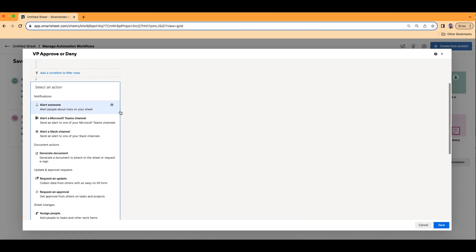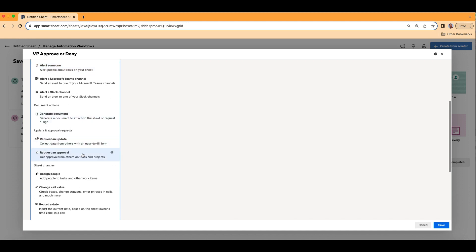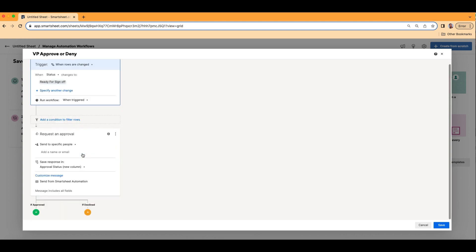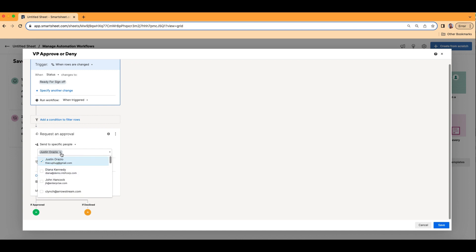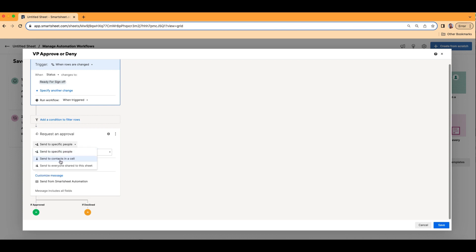Now let's set our actions. Let's go to Request an Approval — this is simply approve or deny. It will ask you: do you want to send it to a specific person, or do you want to send it to a contact in the cell? A specific person will always be whoever you choose, but we don't want that because there may be more than one vice president or more than one person approving in their department. So we want whoever is in the Vice President column. We're going to click and choose the second option: Send a contact in a cell. It's going to pull up all the contact columns — we want to choose Vice President, whoever is living in that column.